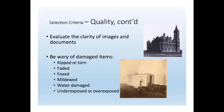As you look through possible materials, one of the criteria to pay attention to is how well organized the collection is already. Processing or organizing and describing a collection takes a whole lot of time — libraries call it cataloging, archives call it processing. Be ready to say no, this collection is not yet ready for scanning — it needs a lot of prep work first in just organizing and identifying the stuff in it. It will be a lot easier to work with a well-organized collection, and it will result in more useful metadata that benefits users after it's been digitized.